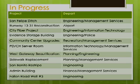The projects that are in process are the upgrades to the San Felipe Road ditch that's being handled by the engineering department and my department. We were asked 2 weeks ago to go out and pothole for utilities in the project area and locate them, to help get the bid price down so we don't, you know, design a pipe going through the middle of a high voltage power line underground or something.